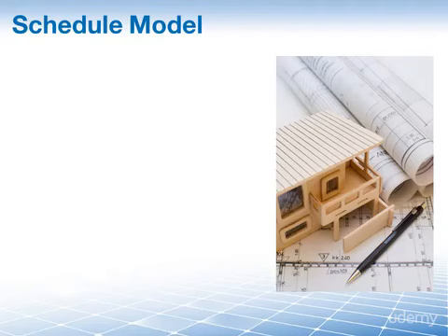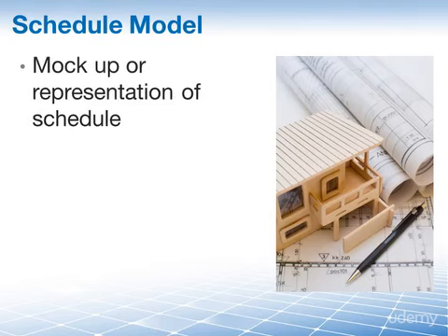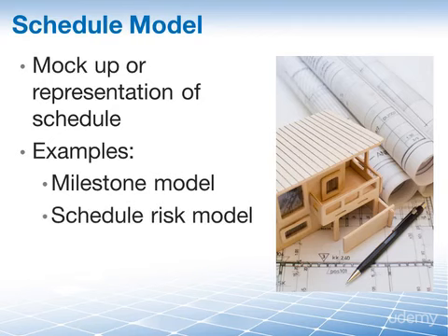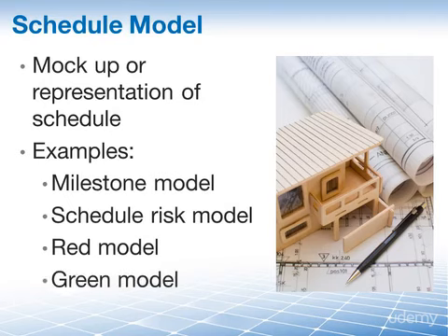Let me try this in my own words. A schedule model is a mock-up or representation of your schedule. For instance, some examples are a milestone schedule. That's a summary level schedule that identifies the major schedule milestones. You could have a schedule risk model that allows you to display risk factors directly in your schedule. Or even simpler, one model displays all your data from the schedule in red and the other displays it in green, so you can print the same data either in red or in green. I know, this is a silly example, but it gets the point across.